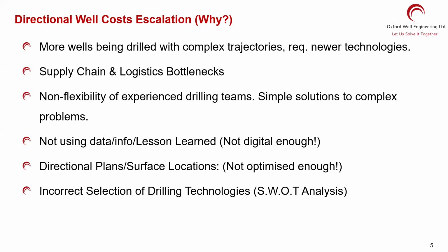And okay, I'll take you to the incorrect selection of the drilling technologies. Drilling technologies could include rotary steerable. They have different downhole tools. They are fancier. Some of them are old-fashioned things. You can have a proper selection of these technologies by using SWOT analysis: strength, weakness, opportunity, and threats. What are the negatives? This is threat. So SWOT analysis you need to do for something expensive.